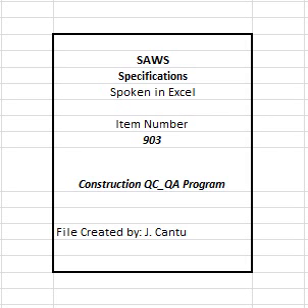7. Documentation. The contractor shall document all QC activities performed during the contract by the contractor, subcontractors, testing laboratories, and vendors in accordance with the contract documents. The contractor shall prepare QC reports consisting of or considering the following items: A. Testing activities, control procedures, test results, nature of deficiencies, proposed remedial actions, and corrective procedures instituted.